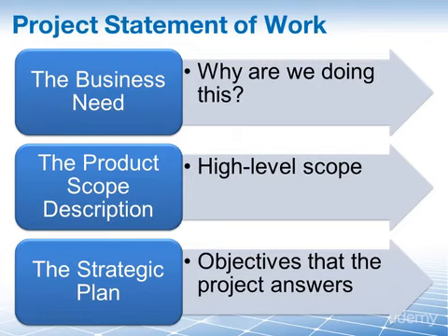So, the project statement of work is usually a description of the work that needs to be done. This description should be written by the customer in their own words, and it doesn't matter if the customer is internal or external. It's also normal that external customers include the statement of work as part of their request for proposal.